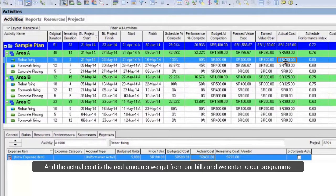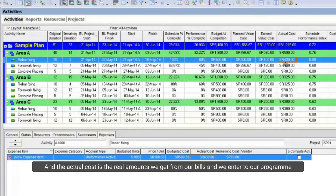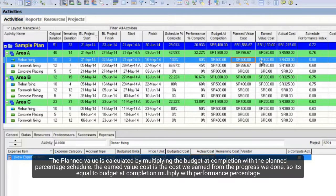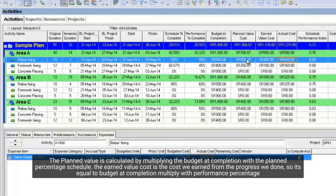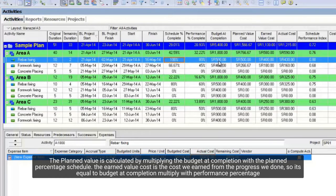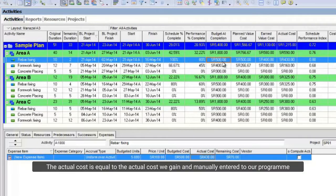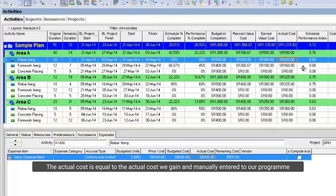And the actual cost is the real amounts we get from our bills, and we enter to our program. So let me summarize it again. The planned value is calculated by multiplying the budget at completion with the planned percentage schedule. The earned value cost is the cost we earn from the progress we done, so it's equal to budget at completion multiply with performance percentage. The actual cost is equal to the actual cost we gain and manually entered to our program.